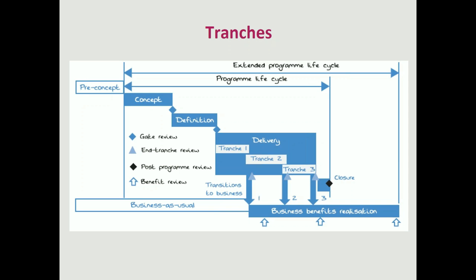And one of the key things about this, and I'll talk a little bit more when I talk about some of the characters, is that during the extended program life cycle, it is up to the business as usual people to deliver on the benefits that the program has enabled them to realize. In many cases, the program during the program life cycle only introduces some of the benefits. The full benefits realization needs to be delivered inside the business as usual.